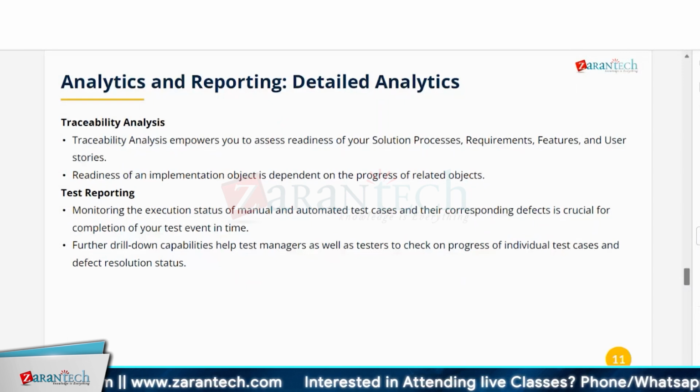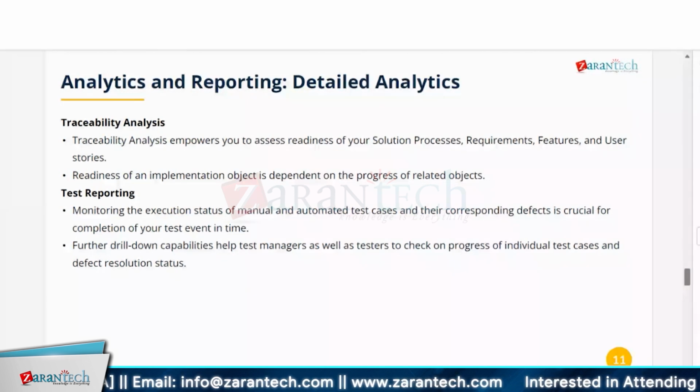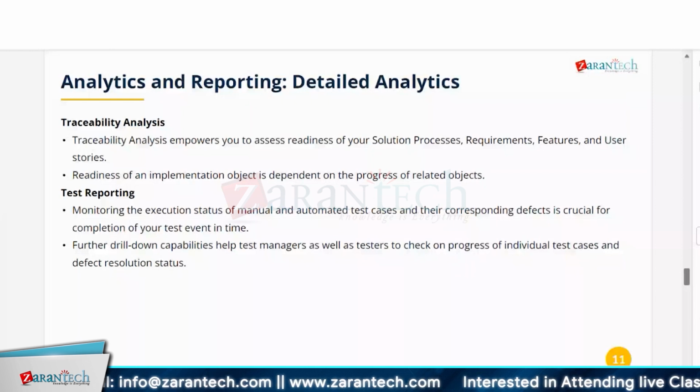Because it is not stopping anyone, and nothing is dependent on the requirements, you have to enforce that the statuses in the requirement are correct. If you need an approval, you put it in approval and request the approver. He or she will come and change the status there itself. In the audit trail you can see that I requested approval, it was approved by the concerned person, and now I'm moving the requirement to the realization phase. So it's documented somewhere.